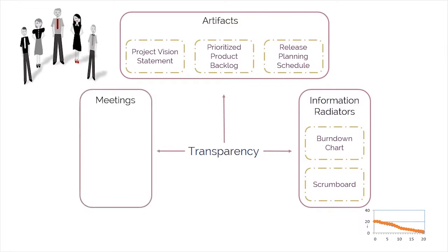And by daily stand-up meetings conducted during the Conduct Daily Stand-Up process, in which all team members report what they've done the previous day, what they plan to do today, and any problems preventing them from completing their tasks in the current sprint.